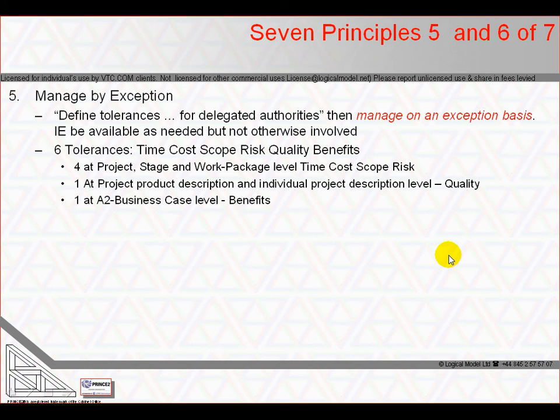Second, it sets limits on the authority delegated between each management level over the allowable variation from baseline plan within each of the 6 axes. Variation includes actual or even suspected or outlooked status. Third, management by exception requires that we establish an assurance regime to give each management level confidence that results and reports from below are an accurate match to reality.